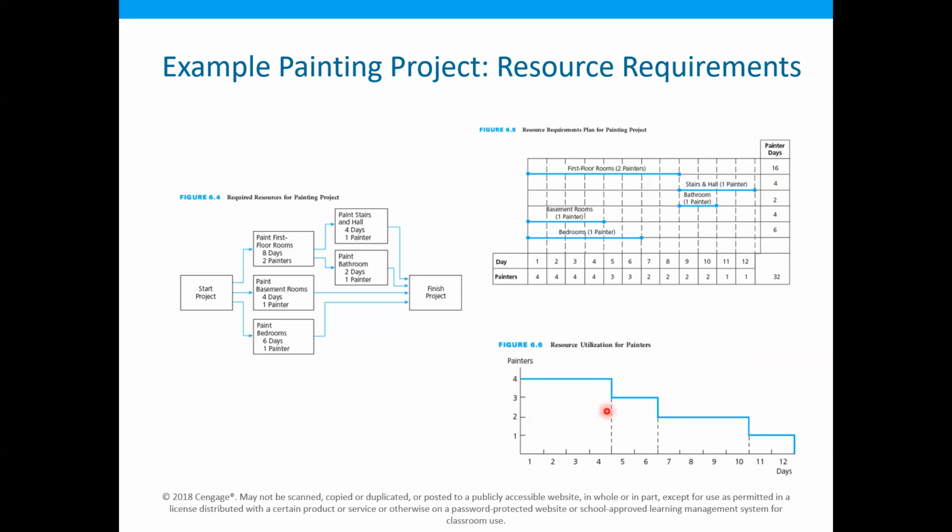Because when you hire resources midway through the project, those resources may also need to learn the task, and it will take some more time for them to do that task. So therefore, in projects, it is needed to have a more smoothed out resource utilization plan.